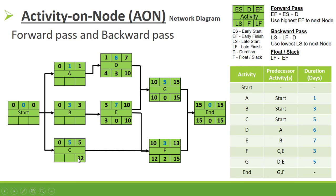For activity C: late finish = 12, float = 12 - 5 = 7, late start = 12 - 5 = 7. For activity B: late finish = 3, float = 3 - 3 = 0, late start = 3 - 3 = 0. For activity A: late finish = 4, float = 4 - 1 = 3, late start = 4 - 1 = 3.